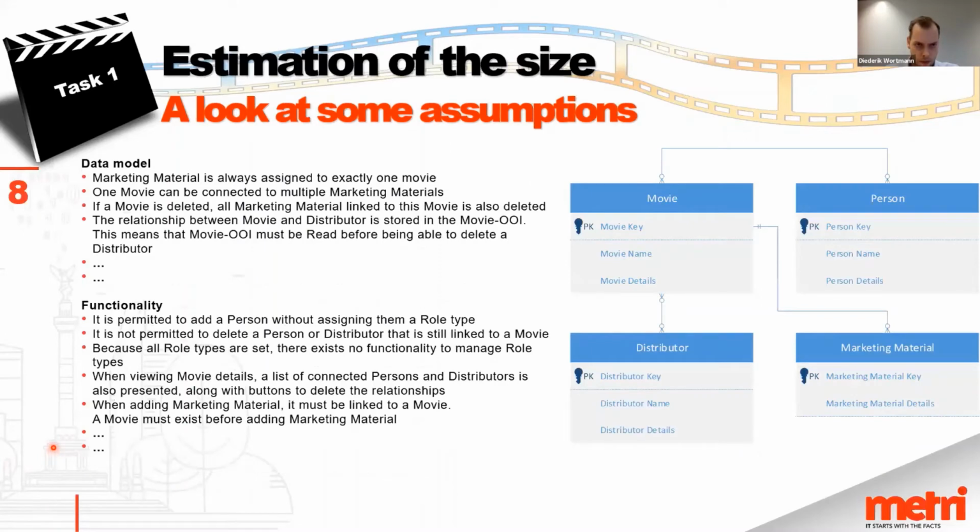And when performing a detailed function point count, determining the required data model is often a good place to start. By attempting to create a logical data model of the requirements, we are forced to make assumptions about functionality that is not quite clear from the requirements that are provided. So requirements may be vague, they may lack details, they may actually skip some functionality, and by creating a data model, we are actually forced to iron out all the functionality that is still unclear.